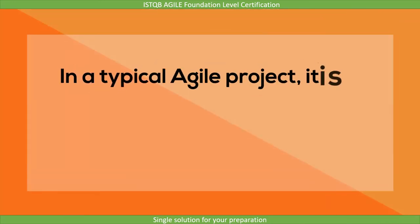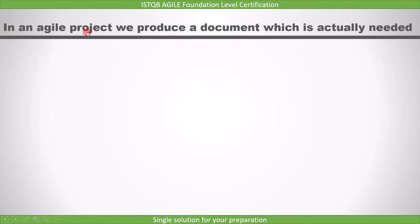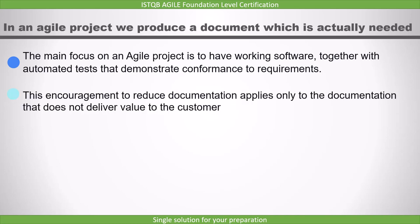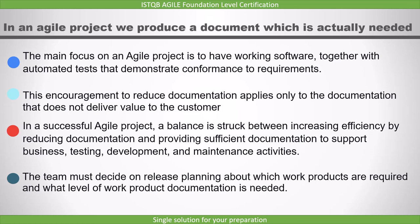Regarding documentation, the most important point is that in a typical agile project, it is common practice to avoid producing vast amounts of documentation. In an agile project, we produce only the documentation that is actually needed. The main focus is to have working software, together with automated tests that demonstrate conformance to requirements. This encouragement to reduce documentation applies only to documentation that does not deliver value to the customer. In a successful agile project, a balance is struck between increasing efficiency by reducing documentation and providing sufficient documentation to support business testing, development, and maintenance activities. The team must decide during release planning which work products are required and what level of documentation is needed.